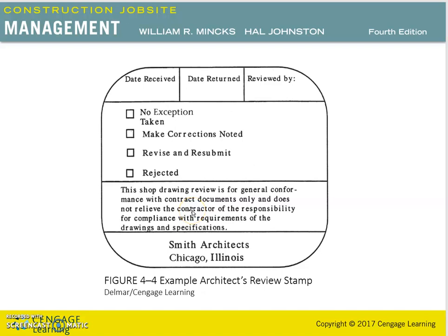However, it must be noted that most contract documents indicate that the architect's approval of a submittal does not relieve the contractor from meeting all contract requirements. If the submittal varies from the specified product, it must be brought to the architect's attention. If the variance is substantial, a formal substitution request must be required.